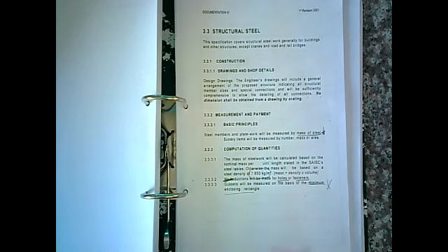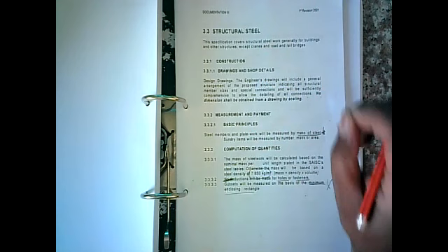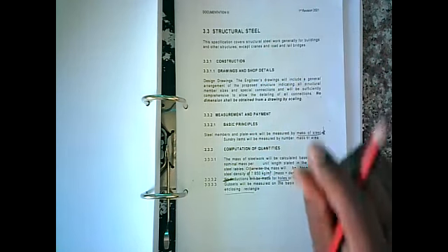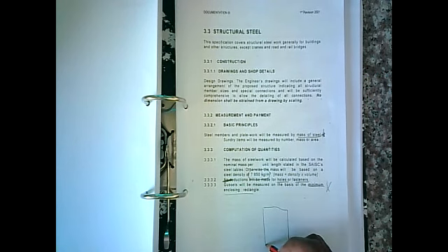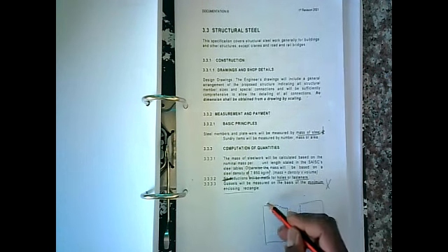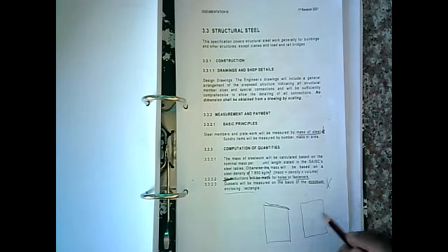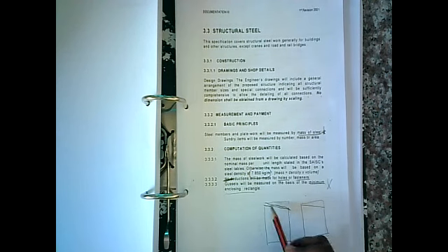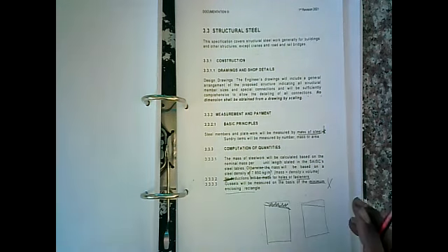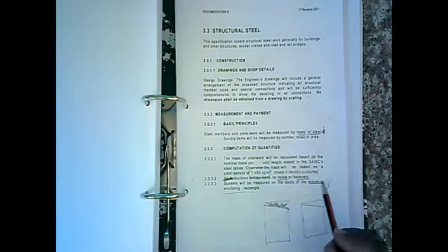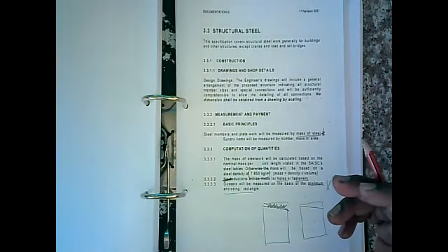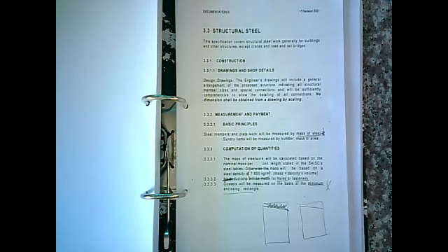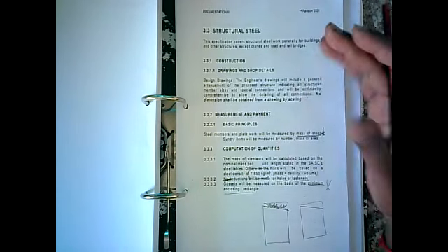I don't propose that. Remember what we're trying to do here. We're trying to quantify a tender document. And tenders, from my experience that I've adjudicated, come down to the last cent. Now, if you take a gusset plate of that shape and say, no, let's reduce it to a minimum rectangle, you're basically saying there's that piece, which is here, and we're including it in the price in the tender document. All right? So there's money attached to this, which sadly can get quite large when you start to quantify large tonnages for a huge structure, and it has a direct impact on the final tender value. Now, this may not make sense to you right now, but in a moment when we start to quantify things, you'll get an idea of what I'm trying to get at.